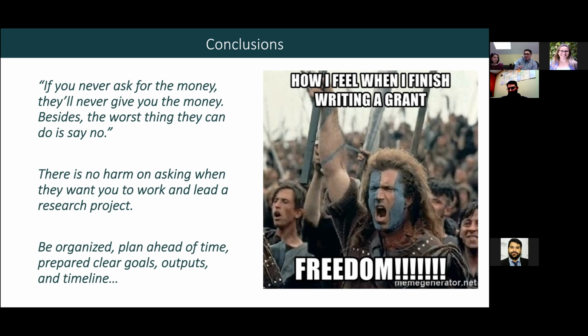Yeah, and there are some flexibilities. For example, with COVID, some of the sponsors are more flexible and give you what they call a no-cost extension, which means they might give you an extra year. They will maintain the funds that you have today, not give you more in many situations, but give you just an extra year to complete your project.